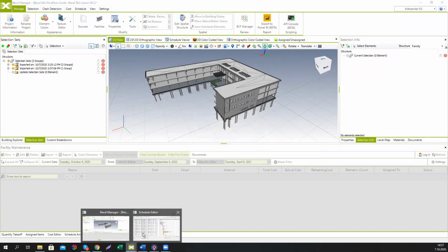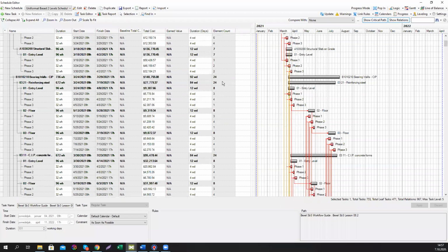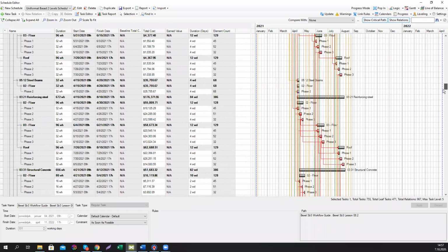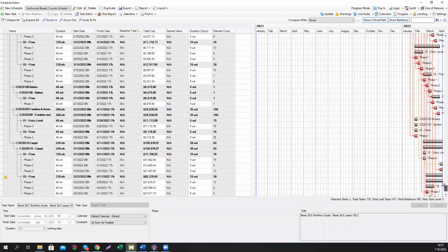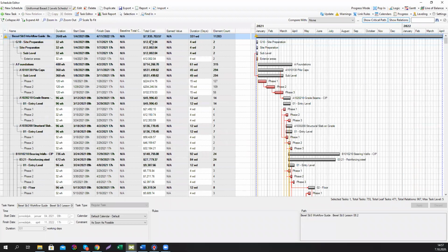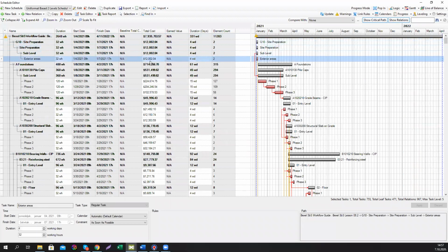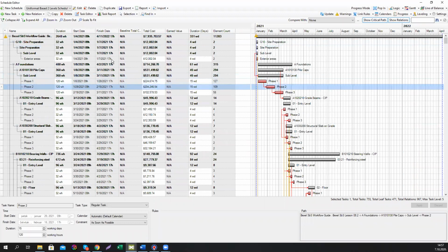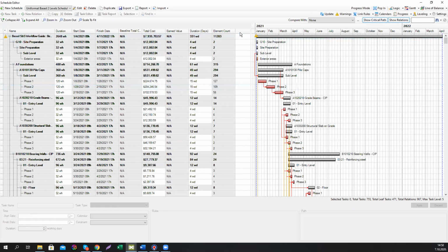Okay, the update is successful. And now we see that the whole schedule is linked to the elements. And you're going to see also that now you have prices or total cost assigned to every task. Also, if you had a schedule with the progress information, we're going to see it next week, you could also see baseline cost, you could see earned value analysis and all different analysis.